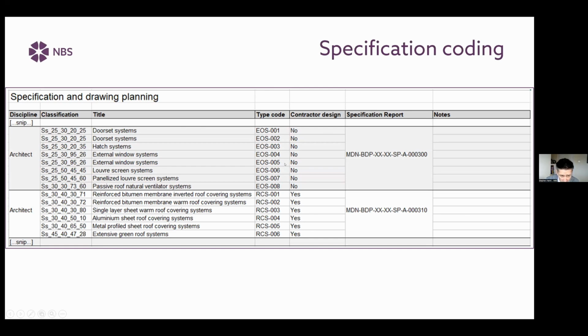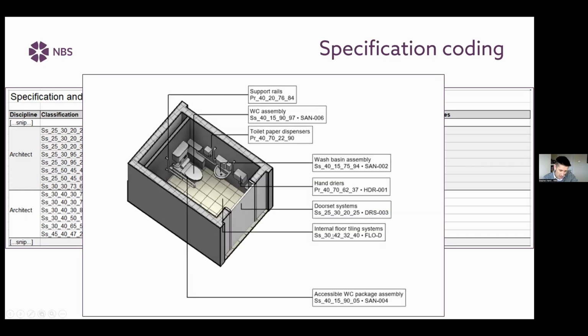And David talked a little bit about design responsibility. Absolutely, before the technical design stage starts, make it crystal clear whether it's going to be the designer working for the client that has the design responsibility, or it's going to be more of a performance spec, performance design, and it's going to be part of a specialist subcontractor package. So really important on the planning.